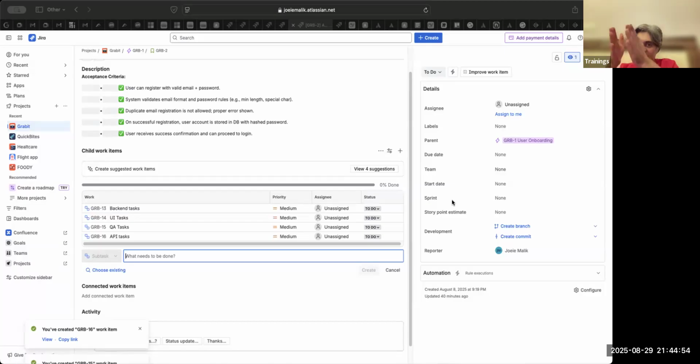So planning poker is a method where, after the story is finalized in its acceptance criteria and tasking, sometimes people don't do tasking. Only after the acceptance criteria, they get into a discussion. But as a good practice, you do tasking also and then start planning poker, because planning poker is a detailed estimation of a story. So after the first round of estimation, the outliers are asked, everybody is saying 5, but why are you saying 3?